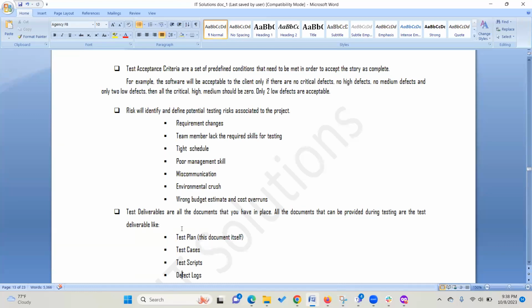You're behind. You spent a lot of time doing all of this, and not just you, every other team, right? Developers and everybody, designer, everybody. They would do their work, and now the client or business analyst comes to you and says, hey, we are changing it entirely. That's a problem. And that's something you want to define here. Requirement changes is a huge risk. So you need to define that and explain, hey, changing requirements at a later point of development is a huge risk. They could change requirements at an early stage of it, right? When the requirement is given.